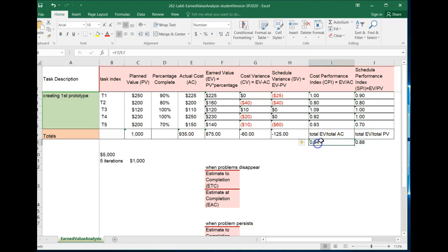And these overalls, remember, this is a question on the exam, and make sure you do total EV by total AC. Do not do average of these numbers. So all these numbers are there, and then I'm going to go to the next step. For that, I'm going to do another video before this gets too long.